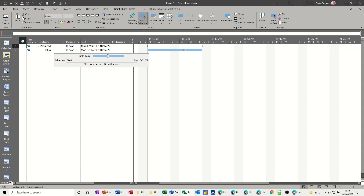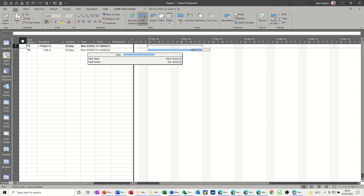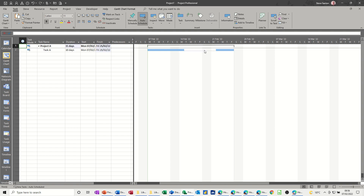So if I wanted to split this from Tuesday the 15th — I'm clicking my mouse and holding it and pushing it. Now you get two dates in this little help: Wednesday the 16th, Thursday the 17th. So if I drop that on Tuesday the 22nd, it's going to end on the 25th. If I let go there, you can see that break. That is a split task.